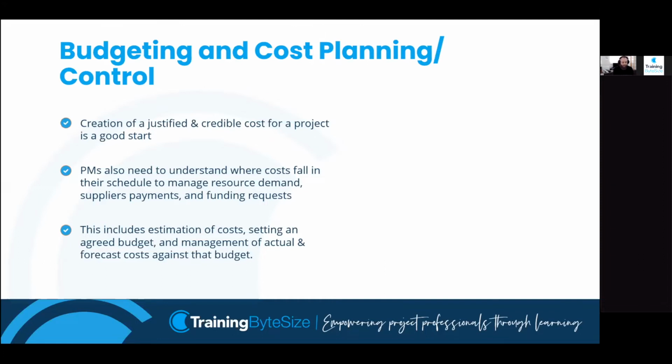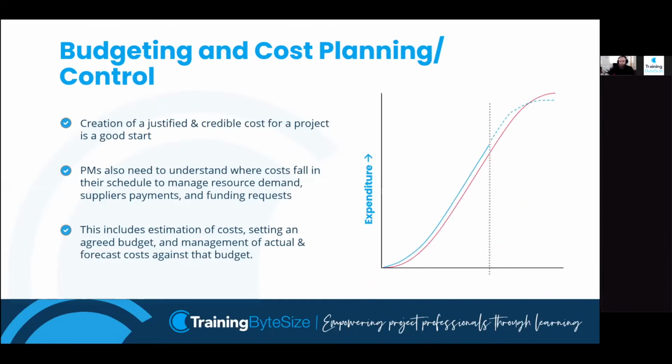But you'll often see a budget looking like that, an S-curve. It's very rare that a project is going to be a straight line. That's going to throw things off a little bit when I talk about EVM, because I will use straight line examples just to illustrate EVM, but most projects in reality will be an S-curve. They have a slow start and then they ramp up when things kick off. And then as the project winds down again, they kind of peter out to a stop.